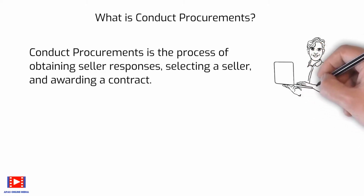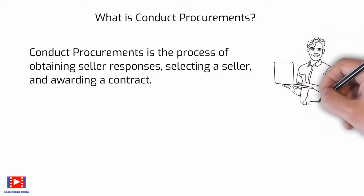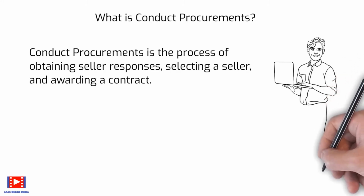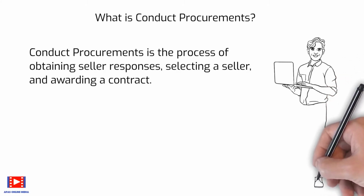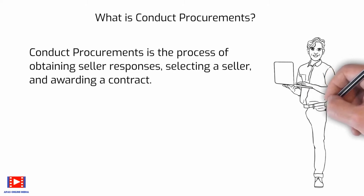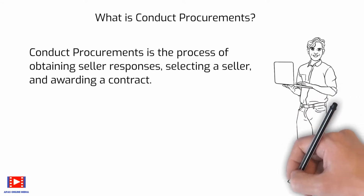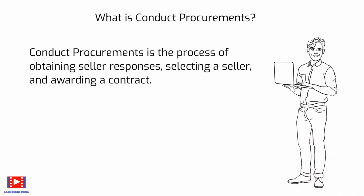On major procurement items, the overall process of requesting responses from sellers and evaluating those responses can be repeated. A short list of qualified sellers can be established based on a preliminary proposal. A more detailed evaluation can then be conducted based on a more specific and comprehensive requirements document requested from the sellers on the short list. Source selection criteria can include information on the supplier's required capabilities, capacity, delivery dates, product cost, life cycle cost, technical expertise, and the approach to the contract.